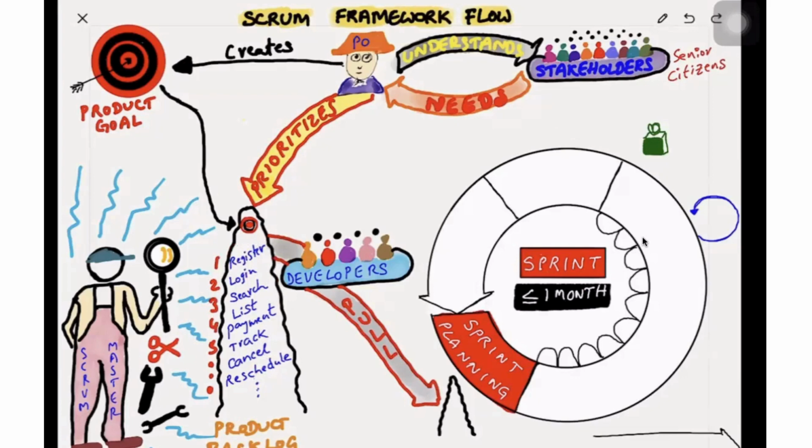How do they do that? Based on the past performance, usually called velocity, based on the best velocity, worst velocity, average velocity of the last 3 to 4 sprints, and the current sprint capacity. Capacity means how many public holidays there are, any people taking personal time off, or developers attending some outside Scrum activities like training or hackathons. Based on that information.